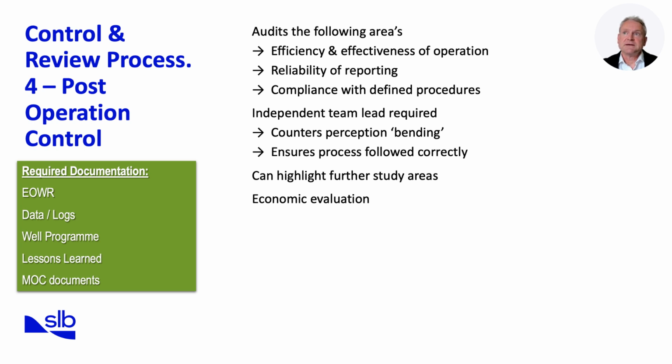To ensure objectivity, an independent team lead is required. This avoids perception bending, where individuals may interpret results to suit their own viewpoint, and guarantees that the process is followed consistently. Another important benefit is that the review can highlight areas requiring further study, such as unusual events or unexpected performance variations. It also supports economic evaluation, helping to quantify the value delivered by the operation.